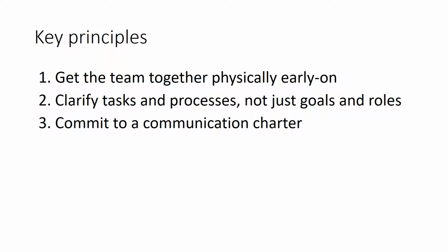Next, for virtual teams, there should be a more systematic and formal approach to defining processes and goals. It means you need a one-page description of who, when, and how, and what we need to do and how we will do it, that everyone on the team could print out and put on their desk, for example.